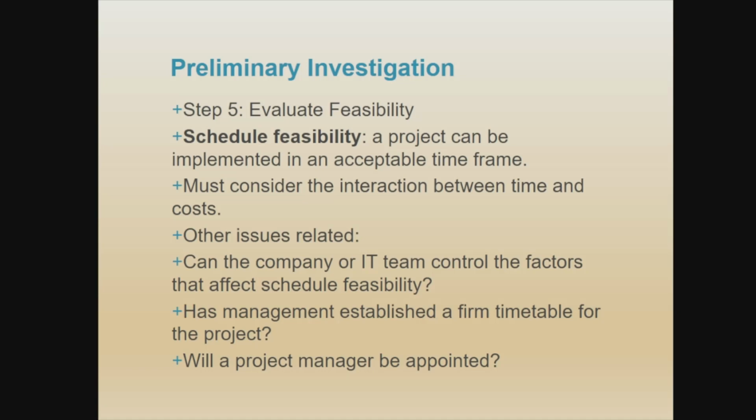Okay, the next part we have schedule feasibility. So a project can be implemented in an acceptable time frame, not rushed in order to come out with the system. We must consider the interaction between time and cost. The longer you need in order to develop the system, the more cost you need to pay. Okay, so that is the interaction between the time and the cost. And other issues that are related.